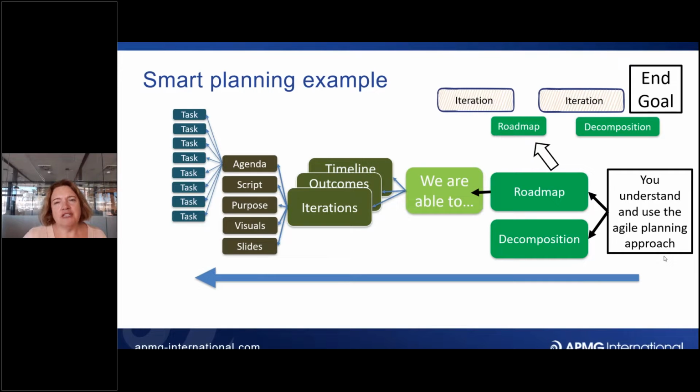So this iterative approach means that I think, well, what's the absolute essential item? If I didn't have any other time, well, as long as you write a script, Mel, you could give a podcast version. So surely that should be in the first iteration. That's the first bit you should do. If you get a chance, do some visuals. That would be really sensible. If you've got loads of time, you can pull together the whole slide deck.